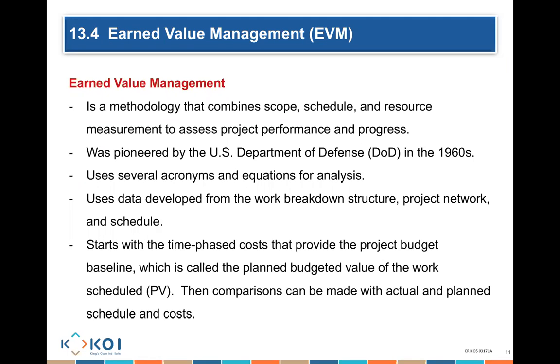Let's talk about when we were supposed to do those things. And when we're supposed to do those things is really a direct relationship to the resources that I'm assigning. Not simply a direct relationship to schedule, but also a direct relationship to cost. Because it's going to cost me more if I assign more resources to finish the job earlier. Now, this approach to measurement is all based on formulas, and it's all based on analyzing what those formulas really mean.